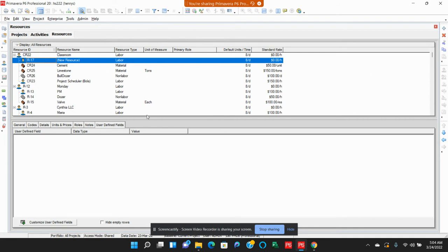And I always like to arrange my work neatly so that when I want to review it next time, I won't have issues looking for my resources or anything I created. So I want to arrange my resources in a hierarchical order. The project name will be at the top, and I will create resources under the project level, on the resource level. So this is like a resource breakdown structure. What you have in here is a resource breakdown structure. For activities, you have a work breakdown structure. This is a resource breakdown structure.